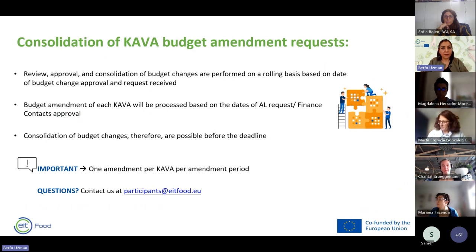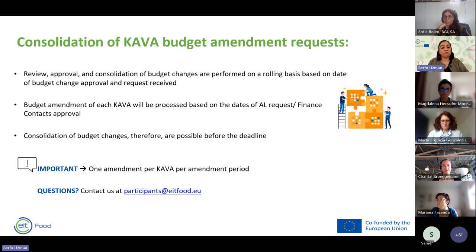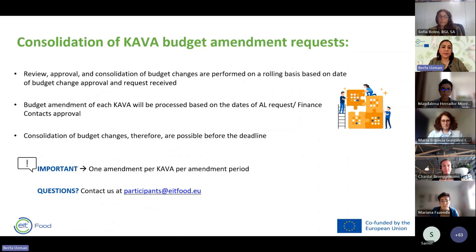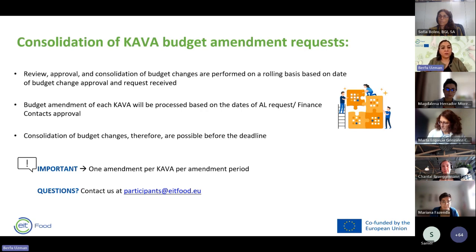Consolidation of the KAVA budget amendment requires review, approval, and consolidation, and these are performed on a rolling basis — you do not need to wait for the deadline and can continuously submit changes. The budget amendment of each KAVA will be processed based on the dates of the Activity Leader's submission and finance contacts' approval. There will be one amendment per KAVA per amendment period, so once consolidated, it is done.